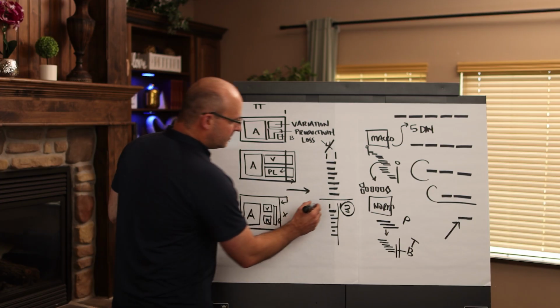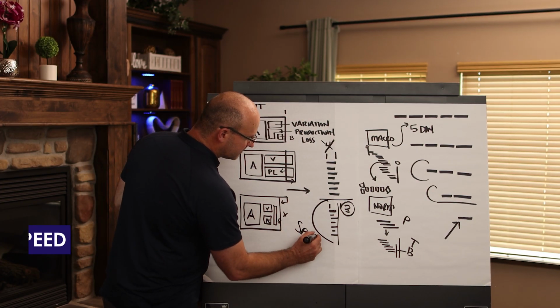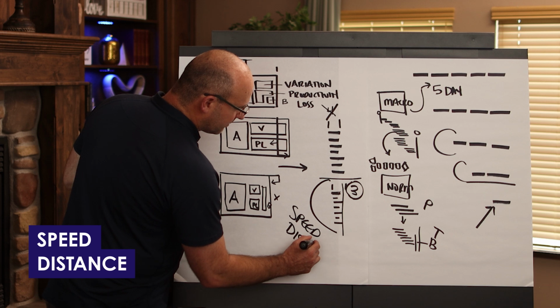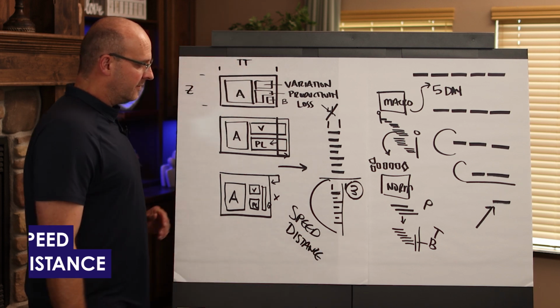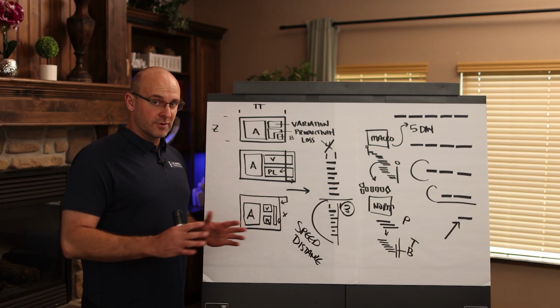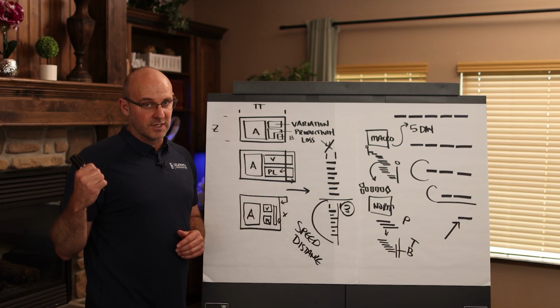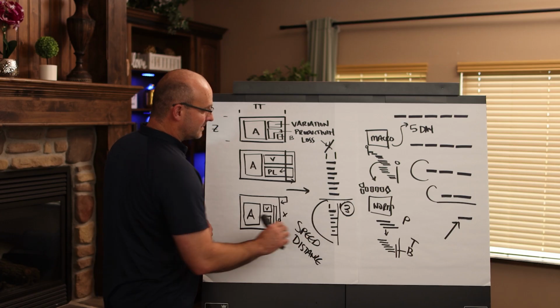Okay, but what you need to do is watch them as a whole, because we've all got to be going the same speed and the same distance apart, right? And let me just say, if you have some contractors that are going a bit faster, but then you've got 2 or 3 that aren't, you can't reduce the takt time and mess over those 3 contractors. You're looking at this as an aggregate.